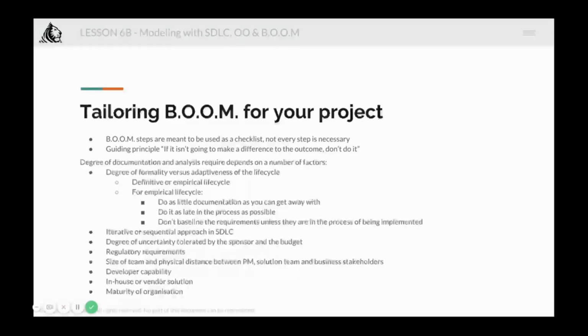For an empirical life cycle, do as little documentation as you can get away with. Do it as late in the process as possible. Just don't baseline the requirements unless they are in the process of being implemented. That is the empirical life cycle. You're just going empirically, saying yeah, this is how it should work. You should also look at an iterative or sequential approach in the SDLC. What approach do you want to take? You can also take both of them. For certain things, you can take a sequential approach. For certain things, you can take an iterative approach.